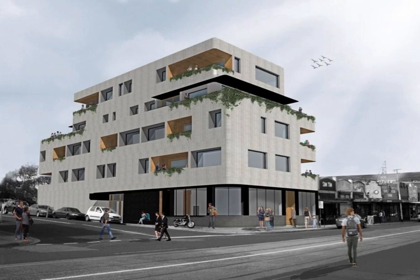We were looking early. The industry is not at a real prefabrication point yet, because we spent a year really thinking we're going to do the CLT panels, we're cladding it in brick, which was an architectural decision, so brick slips. And the idea was we make the panels, the brick people would come and bricklayers would lay inside a factory, the whole panels would come, and then they just all slot together. And the logistics of that, and even the technical issues about how panels go together and tolerances is just not there yet. And so Alastair pulled the pin at some point on that.